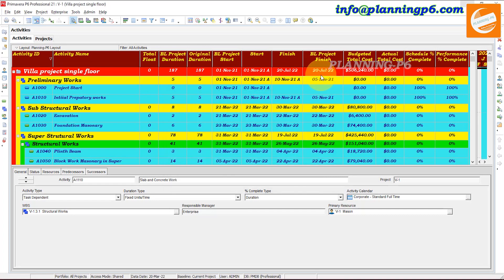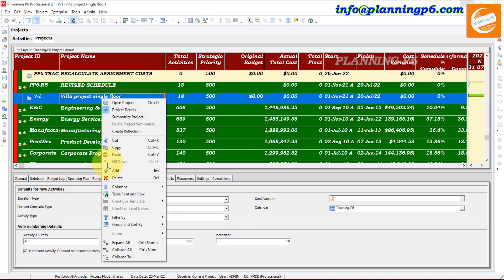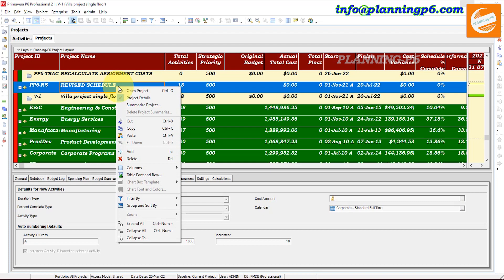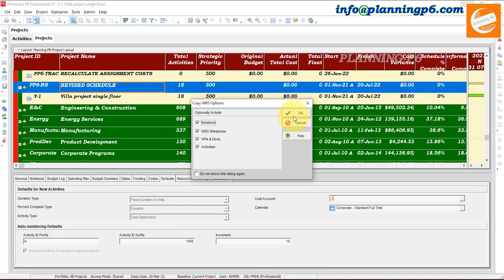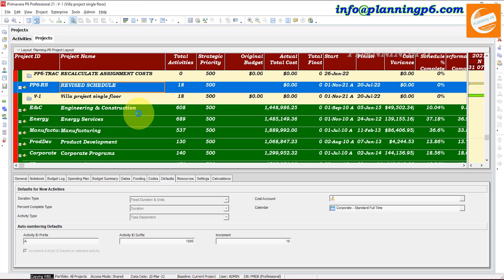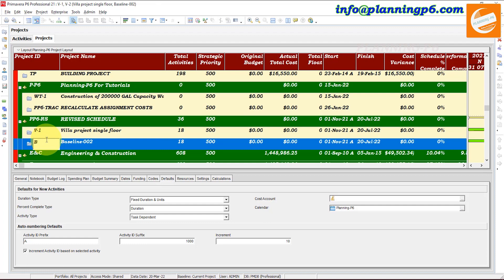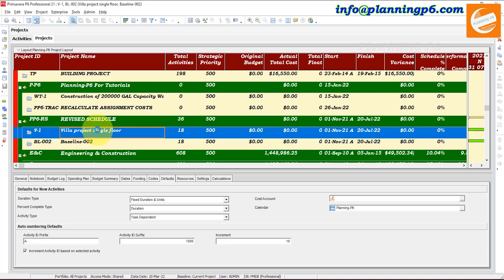20th of July — now what we will do is save this baseline and assign a baseline. This is our new duration and this is how it is working. Go to Projects and create a copy of the same project — copy, then paste. Now it is creating the baseline. You may name it Baseline 002 and label it BL002. Then open this project.